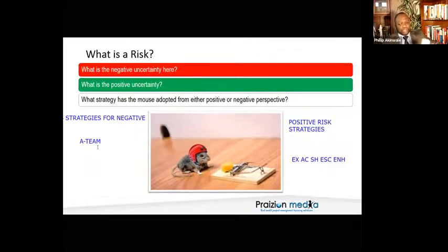So you got to be able to comfortably say, doing nothing before occurrence of a risk is accept. Doing something, like taking action to reduce the probability or impact, is mitigate. A lot of folks get these two mixed up on the exam. You need to be ready for those borderline questions. Oh, Phil identifies a risk could occur. He creates a robust plan to deal with the risk if it happens. It's accept. Because you're not carrying out your plan until the risk occurs. So this is some of the trickery that I want you guys to be aware of on the exam.